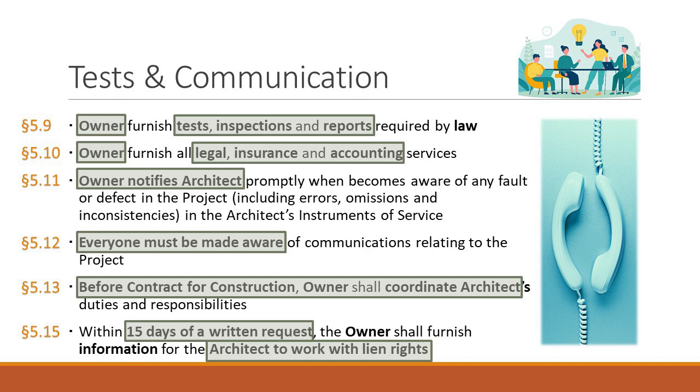So as I told you, every 10 years they update the AIA contracts. So this is the 2017s. In the 2007s and before, both the owner-architect agreement and the owner-contractor agreement were written such that the contractor, if it wanted to communicate with the owner about design stuff, needed to talk to the architect. And the owner had it that way because the owner's like, well, the contractor told me something about it, but I'm not a designer, so I don't know, so it's not my problem, not my fault. And the owner would be like, but you never told me, or the architect would be like, you never told me, I never was part of this, so why is it my fault?